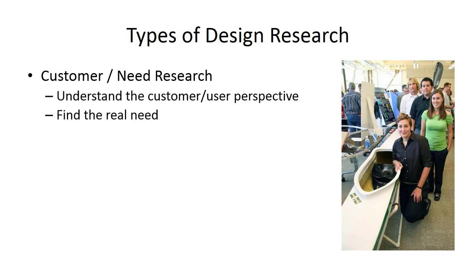So that describes what is in the statement of work — but how do you get there? What work needs to be performed? Primarily it's design research: researching the problem. You're going to start by looking at the customer and what their needs are, and you want to keep asking the question 'why.' When a customer says or shows that they do something, you ask why they do that, and you keep asking why because that helps you dive for the real need — what is the cause of the issue. You might not be able to address the cause, but you need to know what it is because it can drive different sorts of solutions.